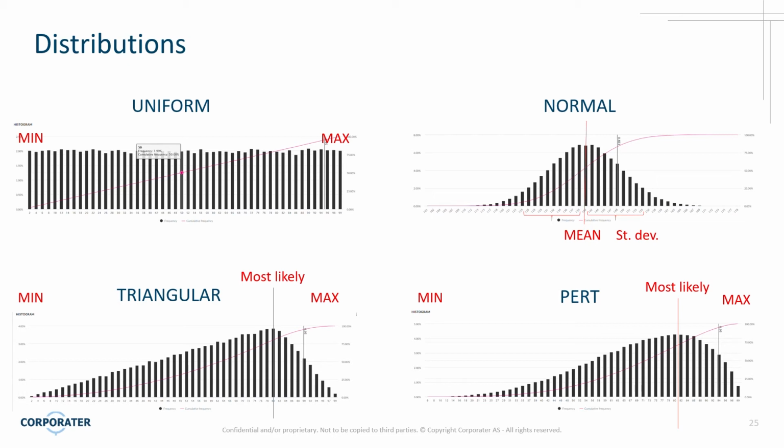Distributions are normally used on the risk impacts. So they're used for modeling the potential financial loss associated with the risk event. And here's an example of how those random numbers are generated based on 4 different distribution types. As you can see, the uniform is what we've already discussed. It's what people normally think about when they think about random numbers, where there's an equal likelihood of getting any of these values. But risk experts are not satisfied with just this basic uniform random values. So we have other distributions as well.